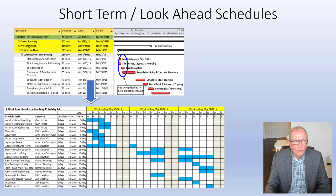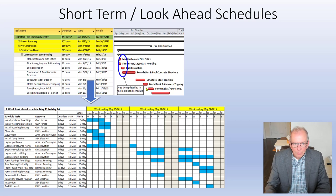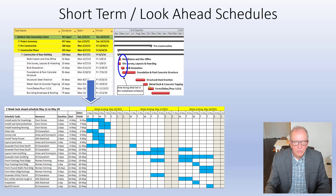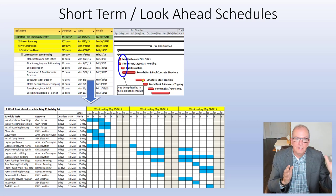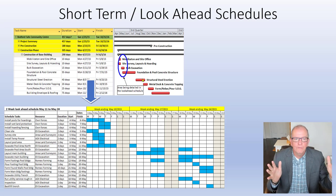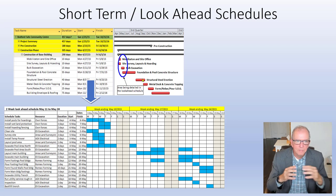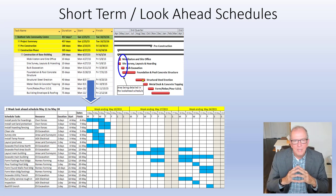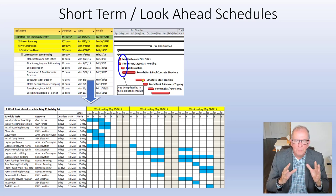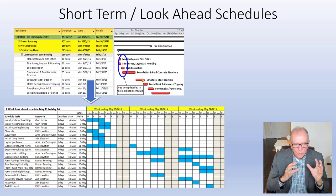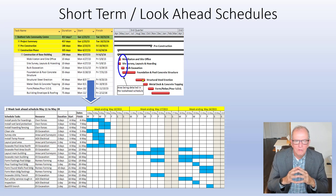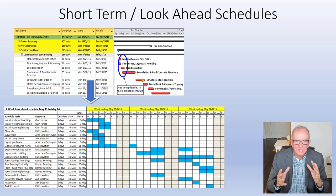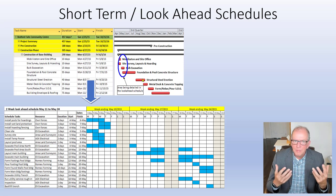We develop this master schedule which is a high level schedule that goes from the beginning to the end of the project. The critical path will spell out the longest path through the project that allows you to finish in the shortest amount of time. Some activities will have float and flexibility. You're doing this at the beginning and quite honestly there's no way you're going to be accurate for everything. But if you don't do that and don't really develop what you have to do on this project, the sequencing with what you know now, you won't implement the project effectively.